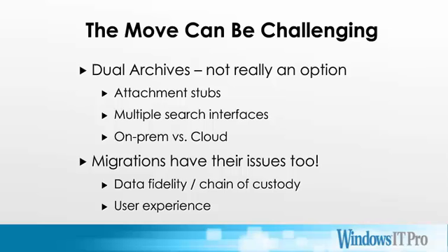Yeah, probably the biggest challenge in practice is the sequencing. How do you make sure that users have access to the data during the migration process itself? If you go down the dual access, dual archive route, obviously, as you've explained, there's big problems with having to look in two places, but even if you're moving it up, that data's in flight for a period of time. So sequencing the movement of data so people can get to what they need to during that migration is absolutely critical.